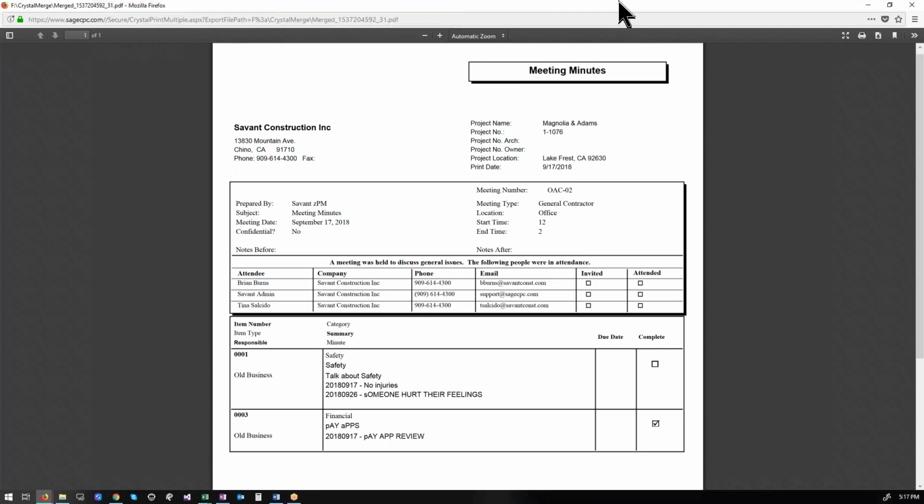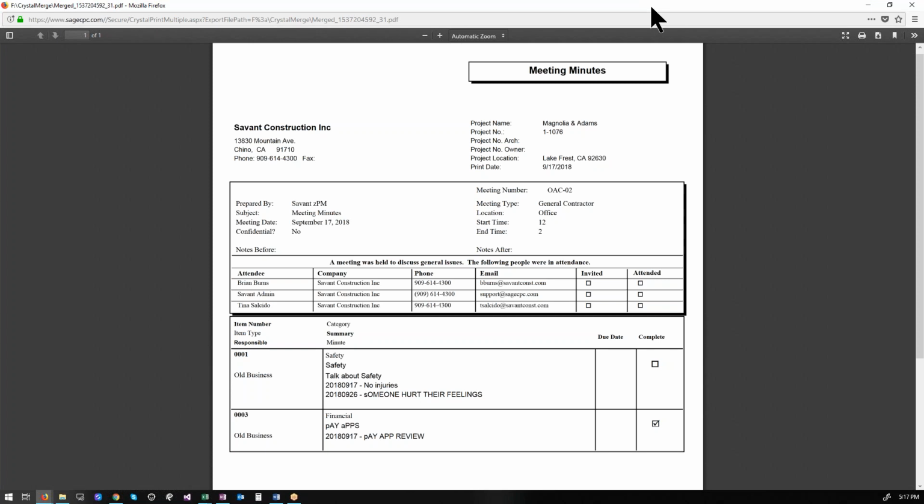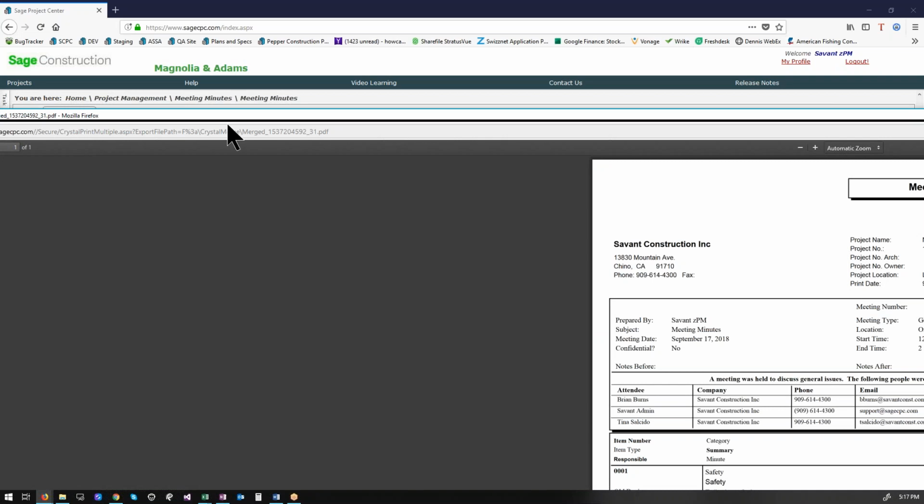How do you close an issue or show an open issue? So here's the complete column up here. You can see this one's completed. Some people like to show complete the following week and then hide it the 3rd week. So you get that history during the printout, but this one is not complete. This is still open. That's how I would do it. So you actually have to hide the completed ones, you're saying, eventually? As you're covering them or reviewing your notes from it, yeah, you'll just want to check that hidden.